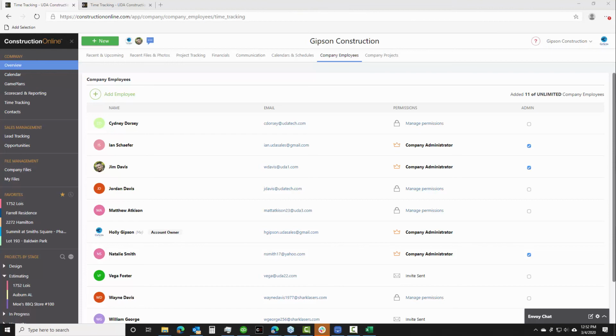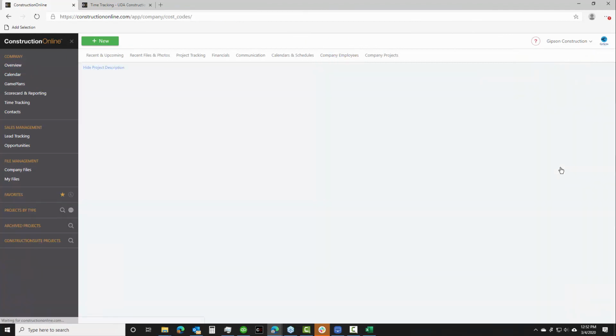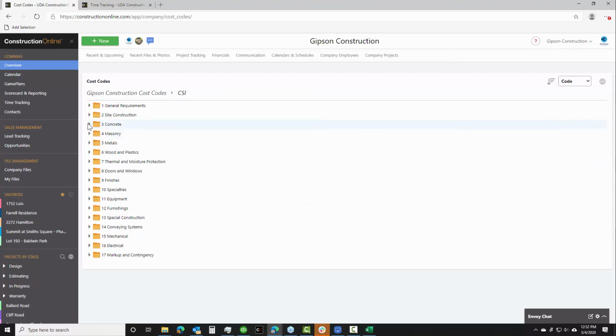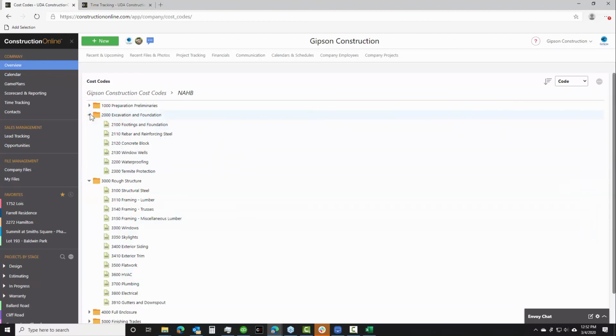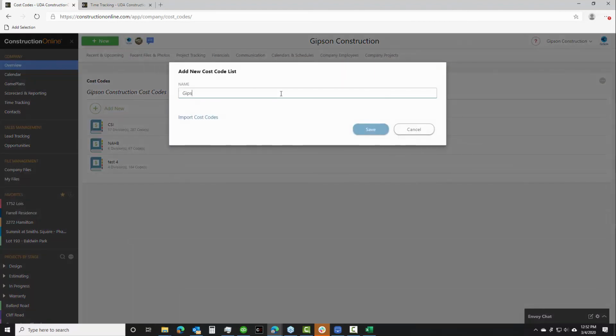Yeah, great questions and a great variety of questions. So maybe we can just touch on a couple of these. It looks like someone out there wanted to know if you could enter in custom cost codes. Looking at that clock in for the cost codes or the cost code designation on the project logs, you definitely can. We provide you with both the CSI and NAHB cost code sets. So you'll have that 17 division set from CSI as well as a set from NAHB already loaded into your account, but you can import or create your list of cost codes for your company if you want to make a new cost code list.